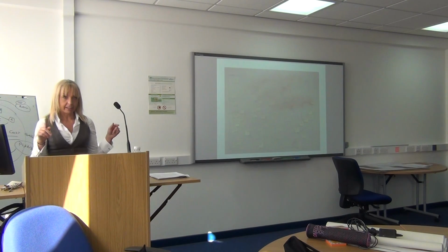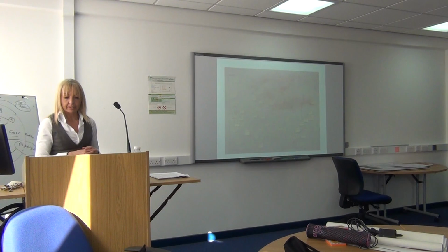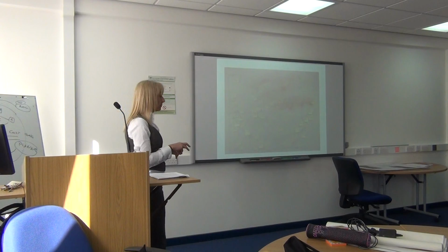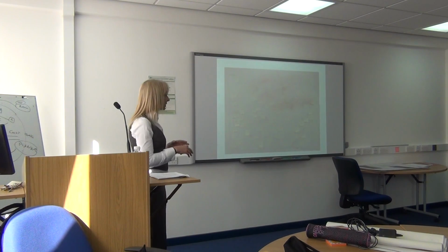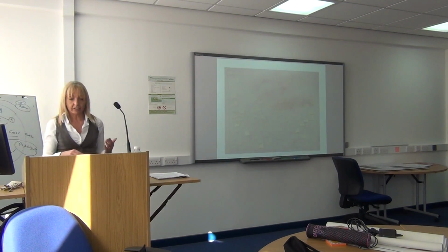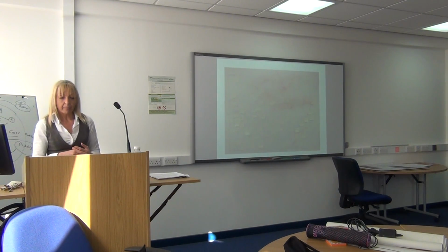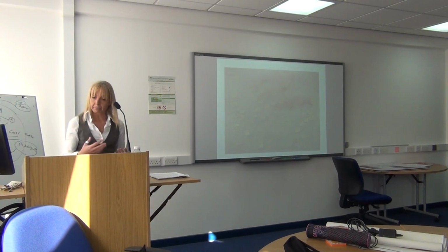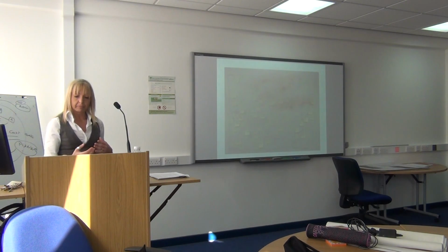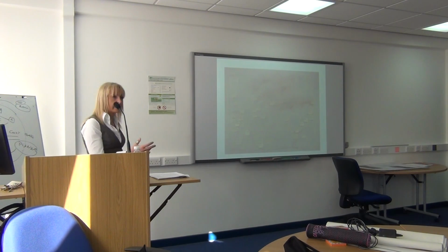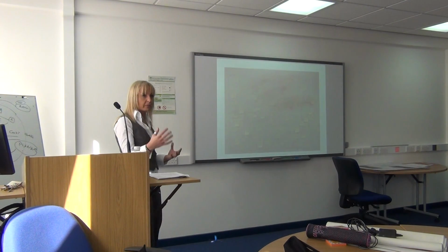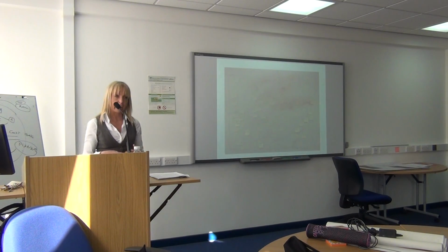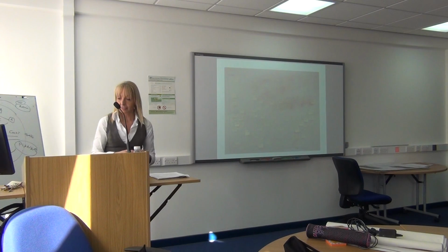So it could have a double arrow on the influence. But it's important to distinguish between the formal and the informal networks as well. The formal obviously could be hierarchical, could be contractual, there could be the reporting lines, i.e. employee, supervisor, agency to government department, subsidiary to corporate office, so it could be departmental, and as I said before, the informal ones are the ones at the more social side of things.